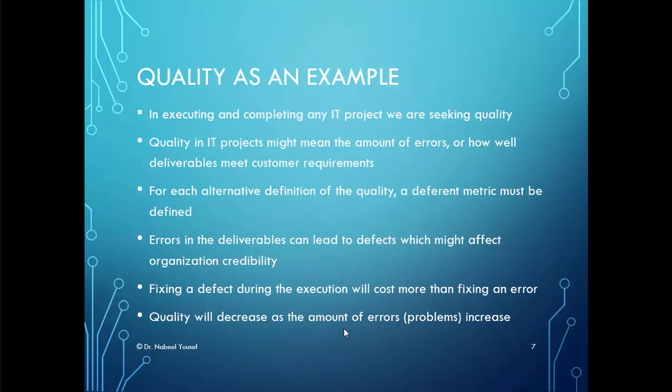To understand project attributes and the proper selection of metrics, let's take quality as an example. Quality in IT projects might mean the amount of errors or how well deliverables meet customer requirements. For each alternative definition of quality, a different metric must be defined. For example, the amount of errors should be measured by the number of errors found in a deliverable or the percentage of requirements met in the deliverable. Errors can lead to defects which might affect organizational credibility.